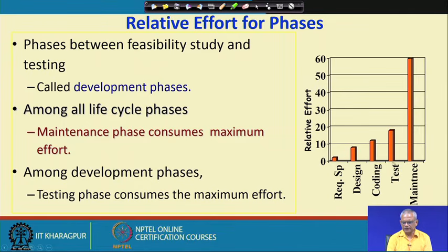And among the development phases, testing requires the largest effort, then coding, design, and comparatively less effort for requirement specification.